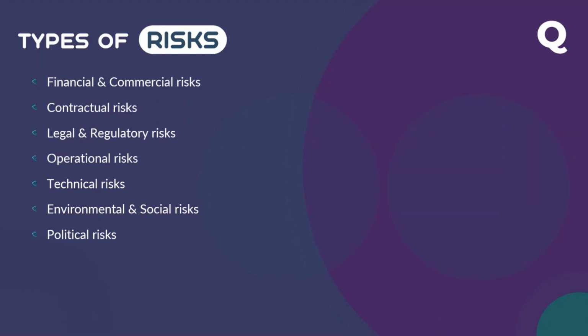For example, if the contractor is not paying the subcontractor and the subcontractor is not paying the supplier, the supplier or subcontractor should not file a case against the employer. So indemnity is both ways. It's not one way. One party should indemnify the other party from his mistakes. Similarly, the client should indemnify the contractor also from his employees or his team or other subcontractors, other contractors, or whatever you call them. Okay, that's basically the essence of indemnity.